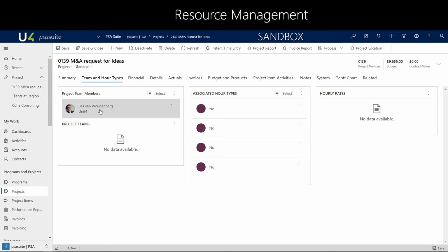So we've created a Gantt chart from a project template with a budget. We've assigned a resource based on skills or based on the request. In the utilization sheet, it shows you that there's requested status on the activity. A resource manager can then approve. The project owner of the project activity will become a team member of the team and can start booking his time and expenses. This concludes the introduction video of resource management.